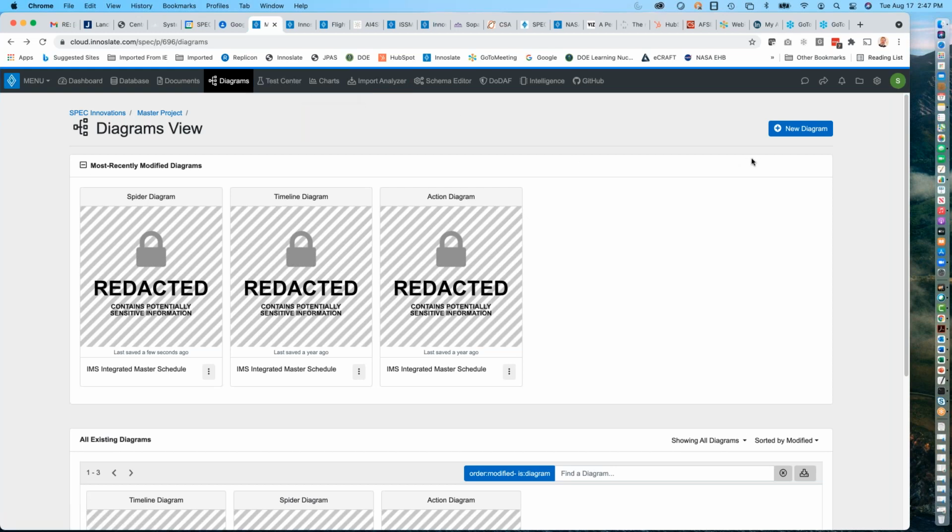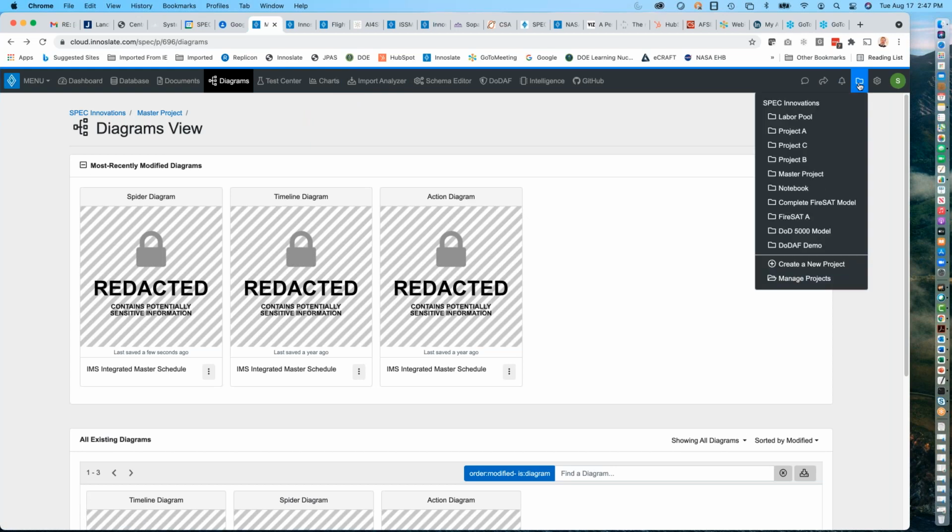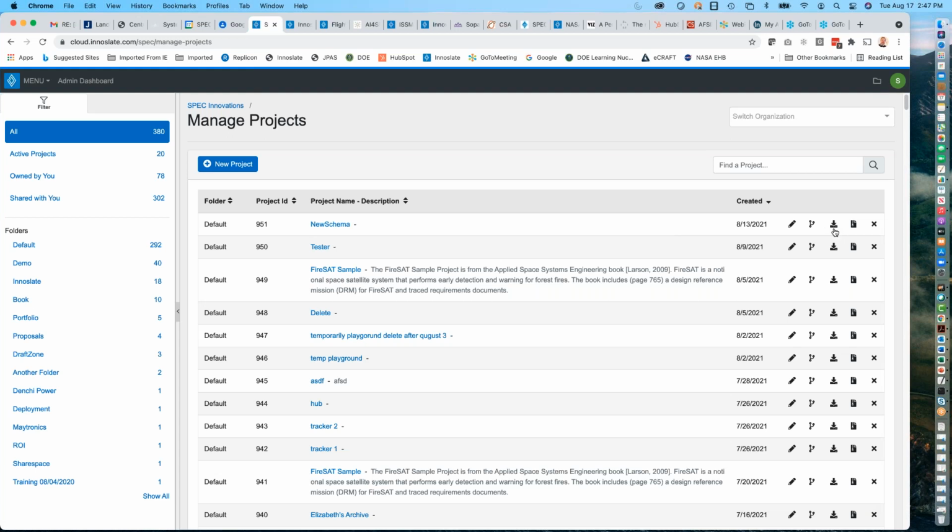But if you really want to baseline the whole database, the best way to do that is to export it and create a baseline that way. That way you always make a branch or a fork, say, I've got a fork I'm going to create for this, and that can be my new baseline. So again, those are the best ways we know to do that right now.